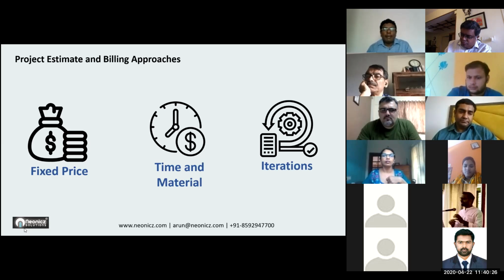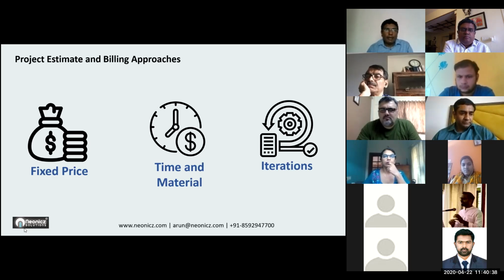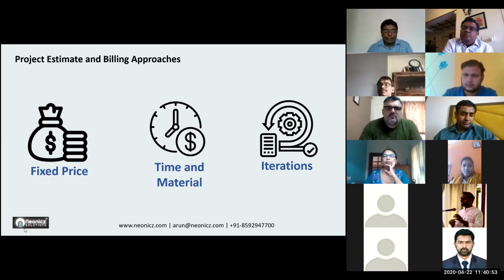At the same time, I will be explaining the three most commonly used ways of project execution and billing approaches. Fixed price is the first one. That is the most common thing. You are actually sure about the product which you are going to develop, which is going to end in less than 3 months, say 2 or 3 months. You are going to finish or launch the product, which has a complete requirement. This is a very simple platform. You don't need to think much about that, and you don't need to think about its scalability. You can very well go to fixed price.